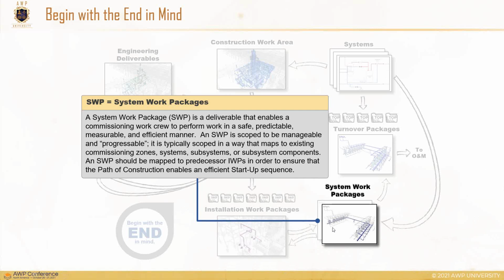And what that is, that's that 70% or so completion where we've often scrambled to remap the project, moving from area-based construction of doing everything in a single spot to now spottily finishing things to hopefully complete a system. Proper use of SWPs helps to limit that impact.